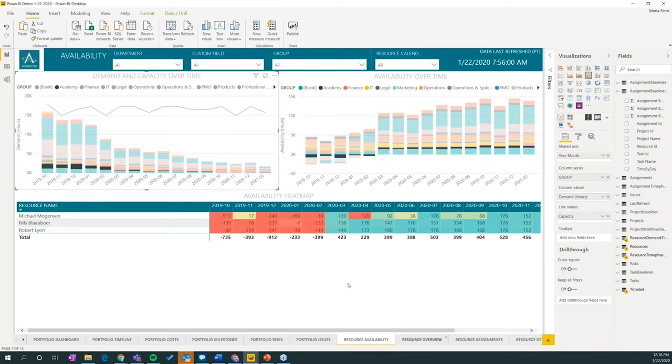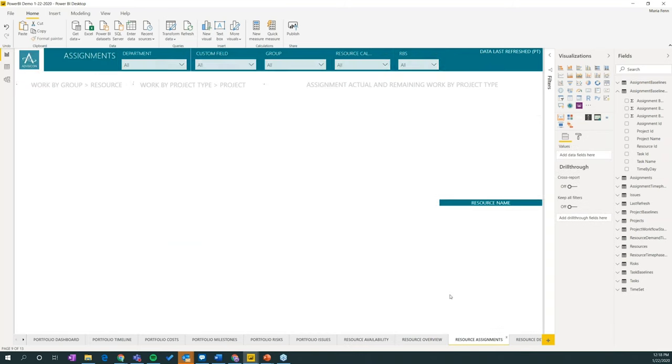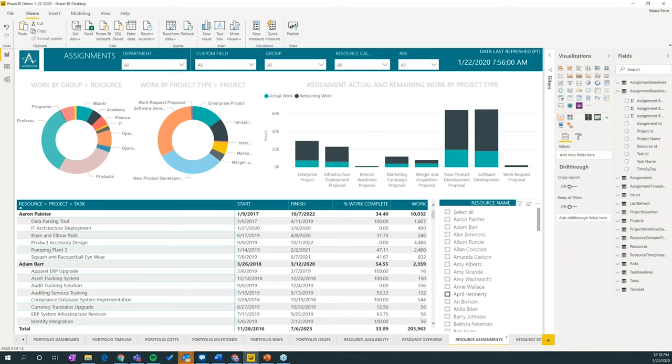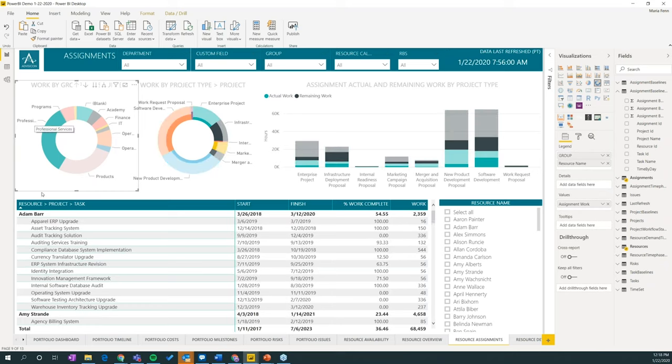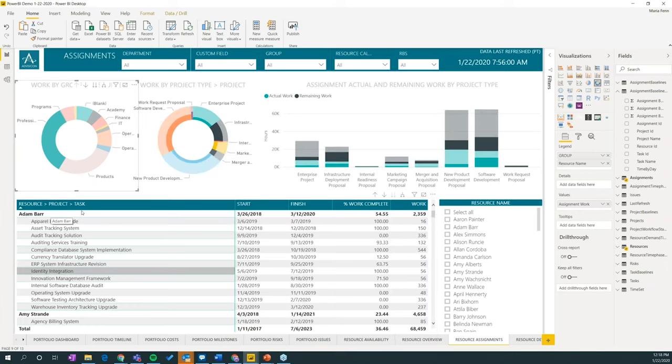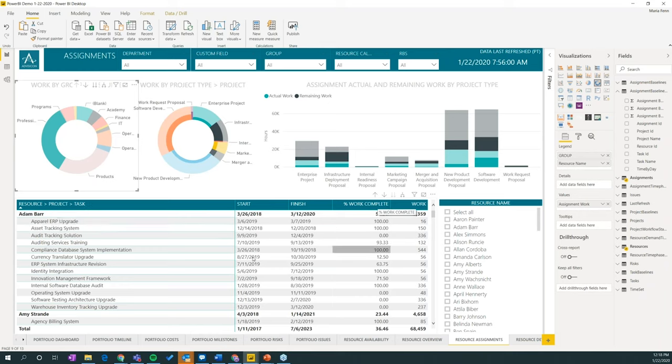Also, another report that is available we have is the resource assignments. And again, how to use these reports for when you're looking at them is clicking around. You've got the different multiple names here you can look at. You can click the different visuals and see, for example, who is in the professional services. You've got Adam Barr, what tasks he's assigned to. You can see here how much of his work is completed. So not all of his tasks are completed, even though, for example, the finish date is 1030. This would be a scenario where you could go, hey, Adam, I'm seeing this task here that you've only got 12% complete, but the finish date was like two months ago. What's going on? That's a great scenario of what you would use this for.